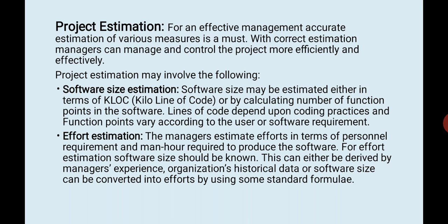Okay, next we come to effort estimation. The managers estimate efforts in terms of personnel requirement and man-months required to produce the software. For effort estimation, software size should be known. This can either be derived by the manager's experience, the organization's historical data, or the software size can be converted into efforts by using some standard formulae. Right?